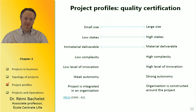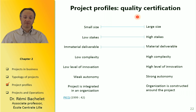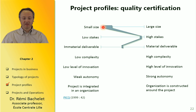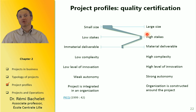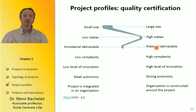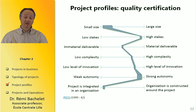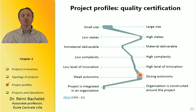Let's look at some examples. Here we have a project about getting a quality certification for products manufactured in a factory. In this case, the project will be small or medium in size. The stakes are very high because without the quality certification you will lose your customers. Deliverables are both immaterial and material — for example, you change working procedures (immaterial) and you also have to put in place new machines. And in this example the project team has a lot of autonomy.